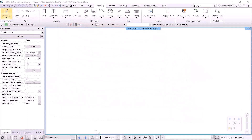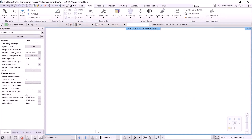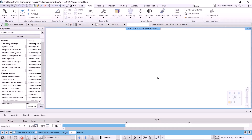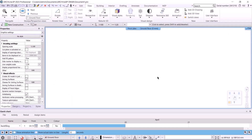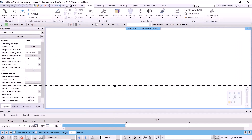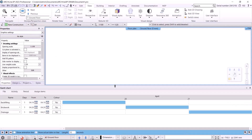We can start the construction animation using the View menu, then selecting the construction simulation command. This will bring up the animation bar at the bottom of the window, which we can resize as needed.